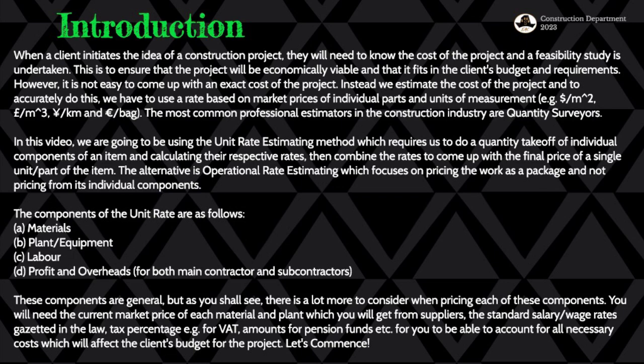We have to consider the pricing of each of these components. Each of these components, as you can see, is based on market prices of the materials, and that will be received from suppliers. So you need to have multiple quotations that you refer to, and they have to be updated, because prices are always changing depending on the updates in the industry and also the production that's happening and all the other dynamics that may affect production of the goods. So you need to follow up on that, which means that estimators need to be updated each and every time.